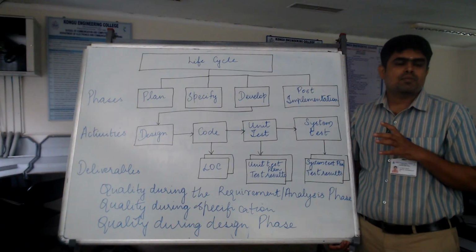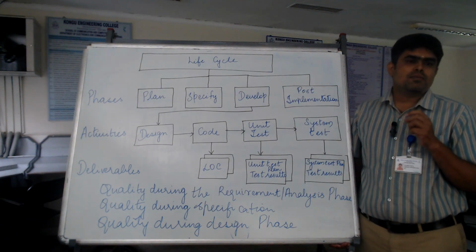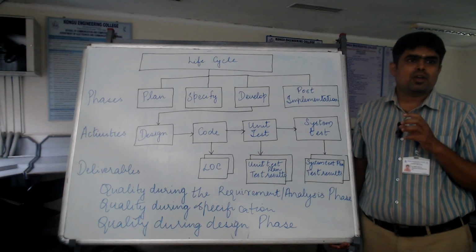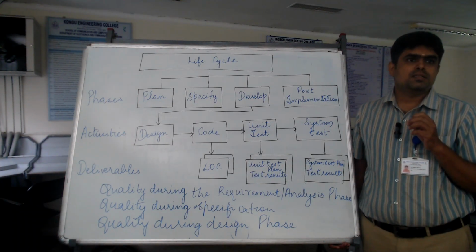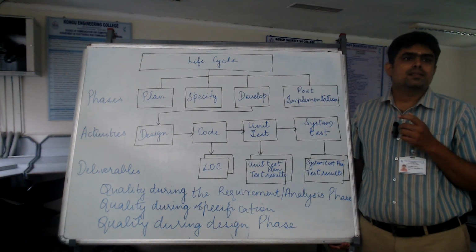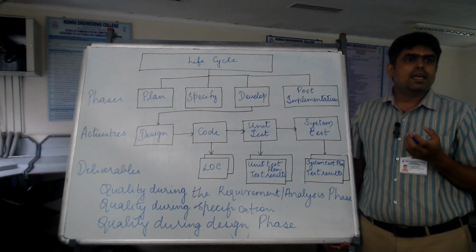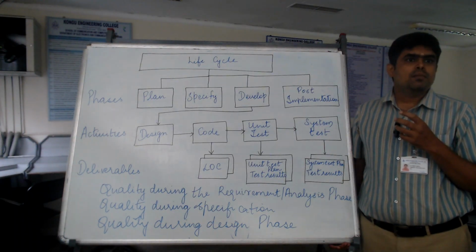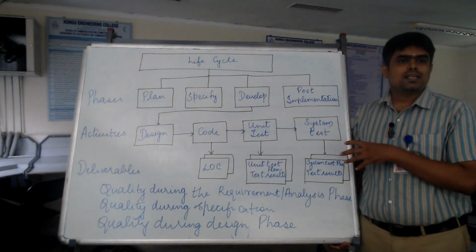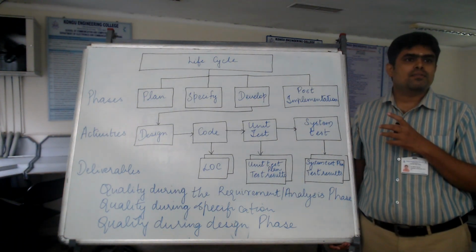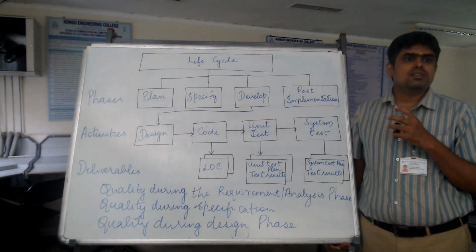These are some of the advantages, and some of the important disadvantages are the mismatch between the client requirement and the product system application which is delivered, and that it is not suitable for accommodating any kind of changes at the last time because testing is in the last fifth phase, and the design must be completely specified and frozen before starting the code.